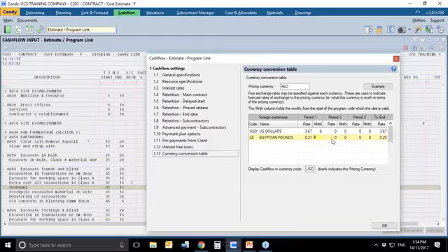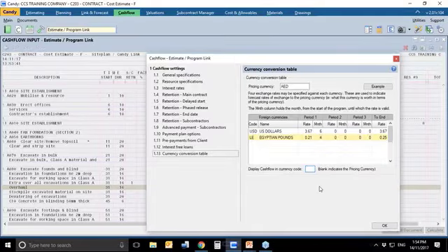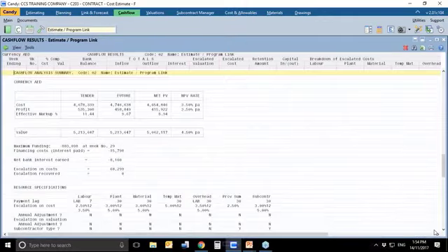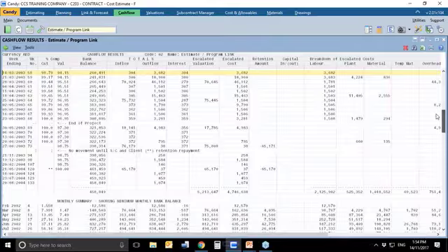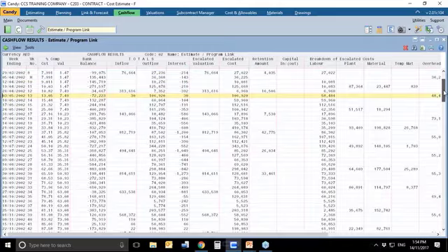Once you've crossed month 5 onwards, up to the end of the contract, the currency exchange rate would be 0.25. And the cash flow results would take into account that. So now, you could display your cash flow results in a currency of your choice. If you leave this currency code blank, it will display the cash flow results, cash in and cash out, money coming in, money out, in the currency code that you've selected.